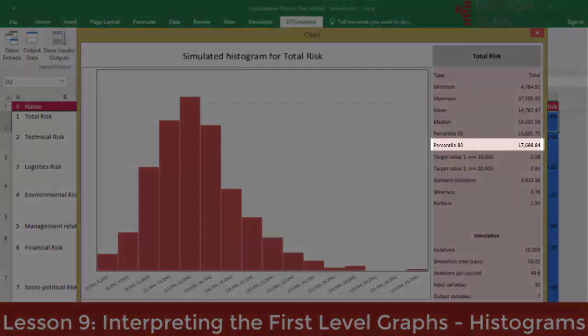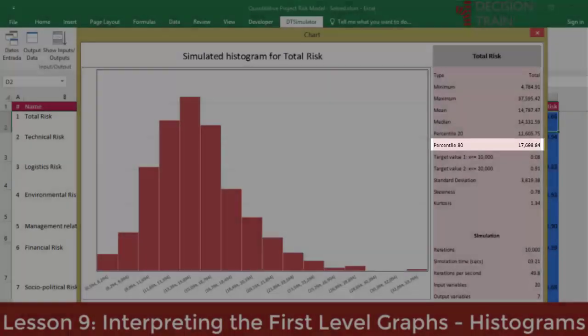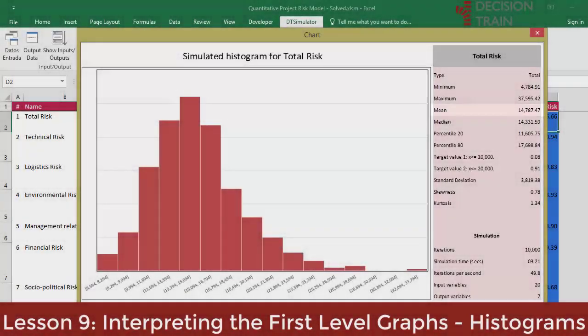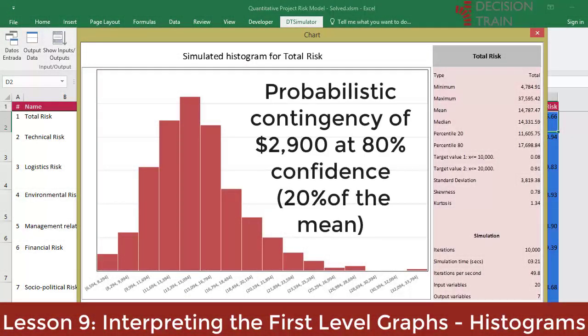If the project owner uses the 80th percentile as a subjective reference for contingency assessment — which is, by the way, standard in some industries — then the difference between the 80th percentile of $17,700 and the mean of $14,800 represents a probabilistic contingency of approximately $2,900. That is, we can affirm that a contingency of 20% of the average value, $2,900 over $14,800, would be enough to cover additional variations in risks with up to 80% confidence.